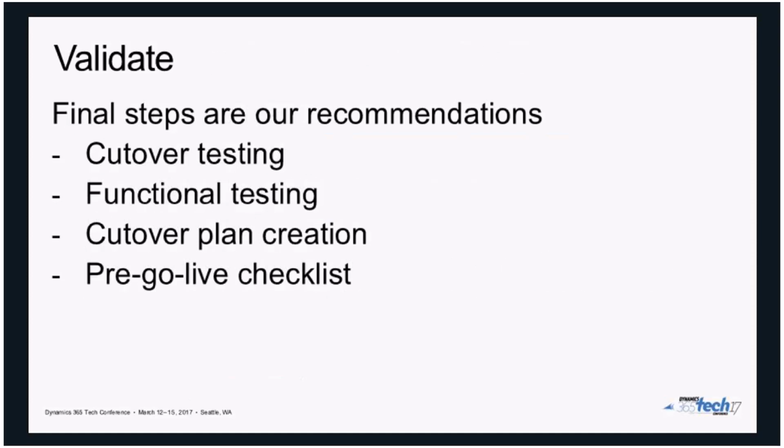The final steps of validation are cutover testing, functional testing, and creating a cutover plan. You have to be very careful about what is going to happen during the cutover weekend, the go live weekend, and spell out each of the tasks that different team members are going to perform during this very critical go live weekend.